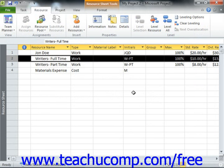For example, you could create Cost Table A for plumbing work and Cost Table B for electrical work for a work resource that could perform both tasks within a single project. You would then need to specify which rate applied to which tasks within the project file when assigning this work resource to tasks.